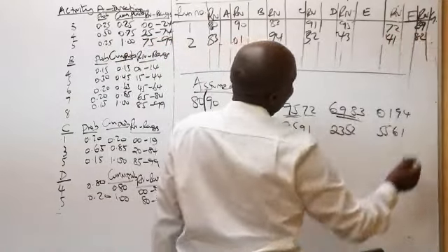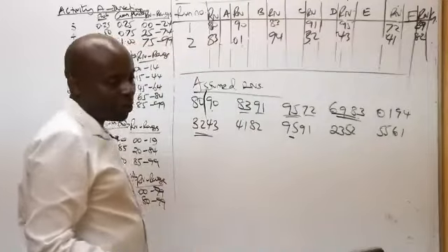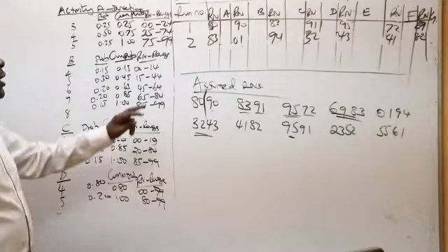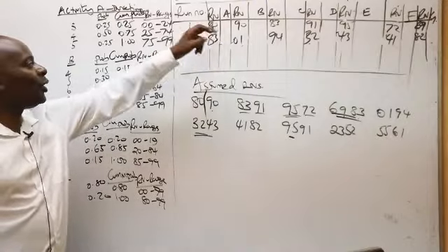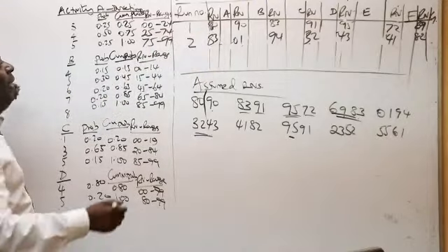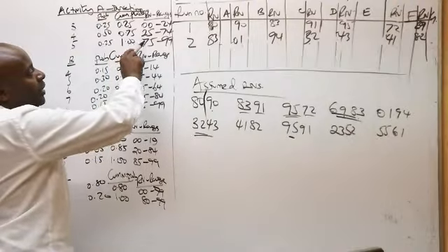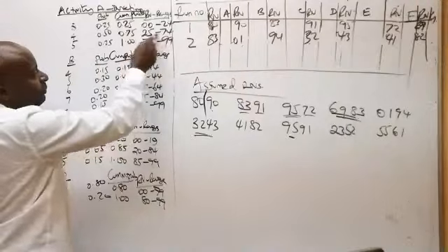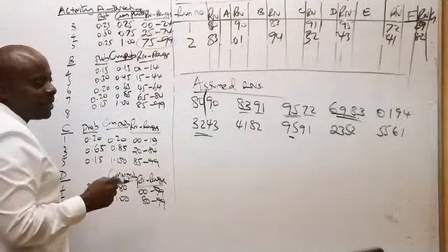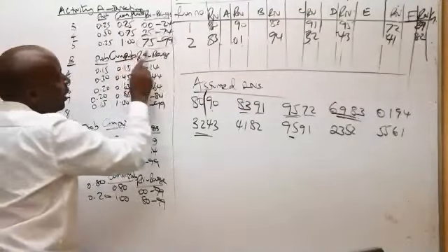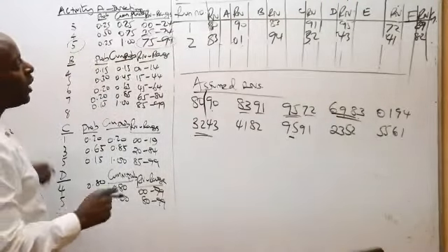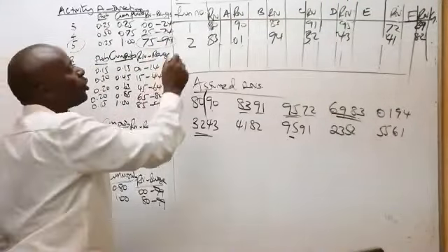Now he will repeat again. Even if you say we have made a mistake, there is no repeating. Now do me a favor, ladies and gentlemen. Random number 80 corresponds to what duration of A? Random number 80. 80 falls here, in between here. It corresponds to 5 days. So 80 corresponds to 5 days for A.